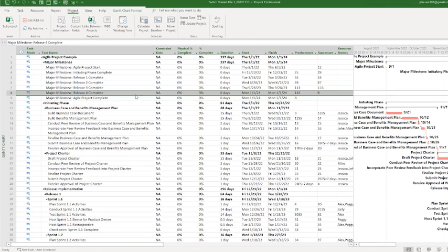So as you see here, you just double click on your task or the line itself, and it brings up this task information window. So it tells you all the stuff, like the general stuff. It tells you its predecessor, if it has any. And not only does it tell you the predecessor, it tells you the ID. Now, there are two types of IDs in Microsoft Project. You have ID, which is over here, that constantly shifts and moves when you move tasks around or delete tasks.